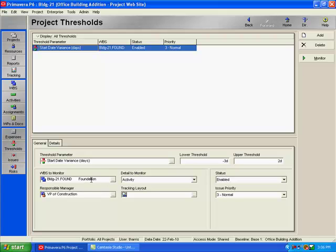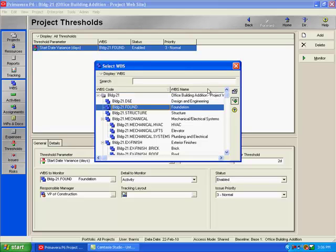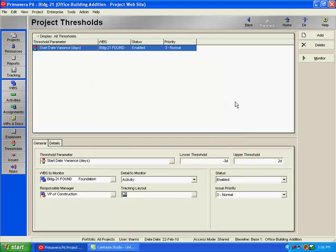Next, I can decide which WBS element I would like to monitor. So if I click on my Browse button, I'll see all of my WBS elements on this project. And I wanted to specify the foundation WBS element, that's the only one I'm wanting to monitor at this time.